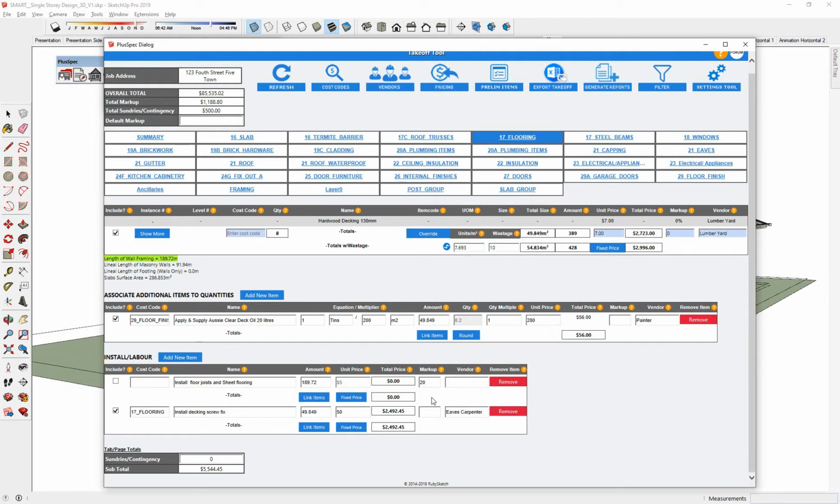So I'm going to say 20%. You might negotiate a better rate with your subcontractors, and you might put 25 or 30, whatever it is. And down here's contingency as well. For instance, putting the deck on, what are we at? We're at fix and screw the deck at 2,400. You've still got to buy the materials, which is 2,700. You know what? I think that's more than enough.